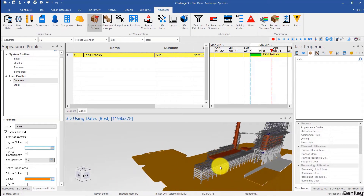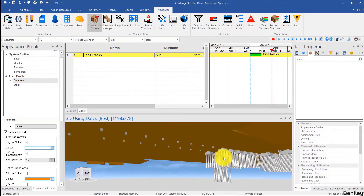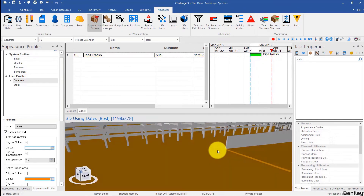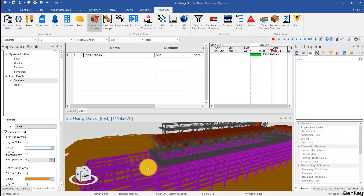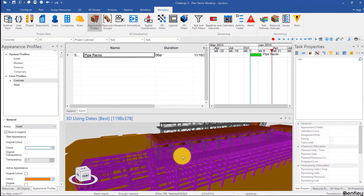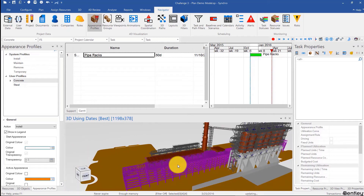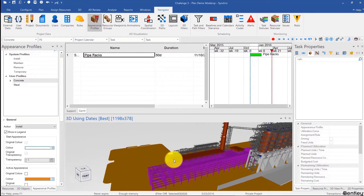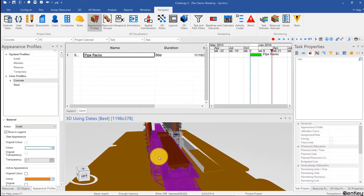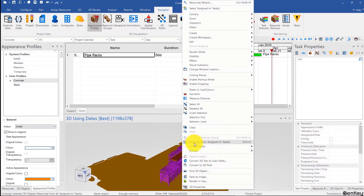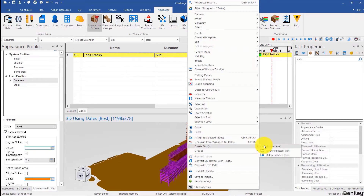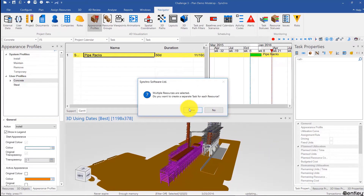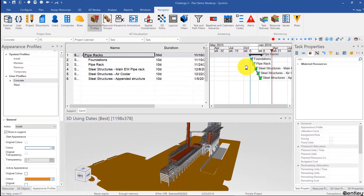Then I'll click on that task. I'll look at the foundations — these are concrete — so I'll click on those, then I'll click on the pipe rack over here, then I'll click on the steel structure, and maybe that's enough for now, or I can also click on that over here. Then I can right-click, create tasks under selected task. You have to make sure the right task is selected — so I'll make sure it's highlighted in yellow — then right-click, create tasks under selected task, click yes, and you'll see it'll create tasks in the order I clicked on.